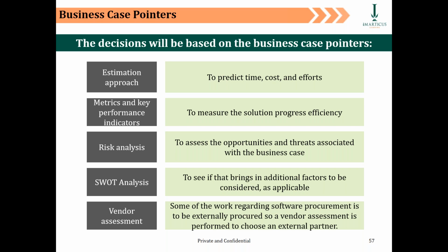Because see, when is the business case approved? Once you finalize requirements, put them into your BRD, develop a good, detailed business case, and go hit your stakeholders. Present your business case. If it is approved, they approve the whole thing, give proper budgetary allocations, and then your BRD goes down to your IT teams and other teams to start the build, component to component, software to software, hardware to hardware, and such perspectives. So obviously it is before the BRD.